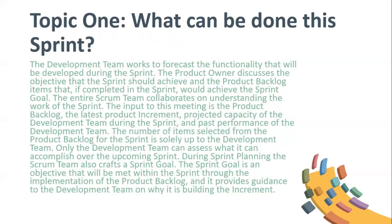The input to this meeting is the product backlog, the latest product increment, projected capacity of the development team during the sprint, and past performance of the development team. The number of items selected from the product backlog for the sprint is solely up to the development team — only the development team can assess what it can accomplish over the upcoming sprint. During sprint planning, the Scrum team also crafts a sprint goal. The sprint goal is an objective that will be met within the sprint through the implementation of the product backlog, and it provides guidance to the development team on why it is building the increment.